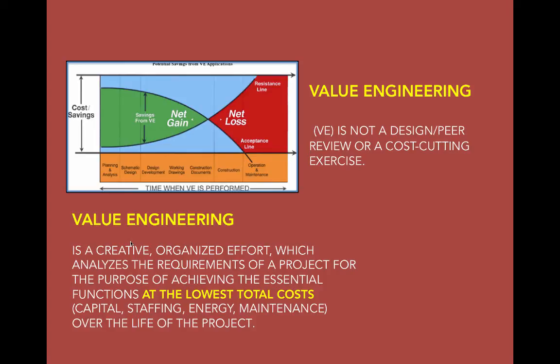So oftentimes you have to pay a restocking fee. Oftentimes you won't get a full credit dollar on dollar, and then you'll be hit with an increased cost for something else to go in. So cost savings through this portion of the work and through working drawings, you don't get the full benefit of value engineering and cost management. So this is really the area where you need to focus if you want to get the major savings.